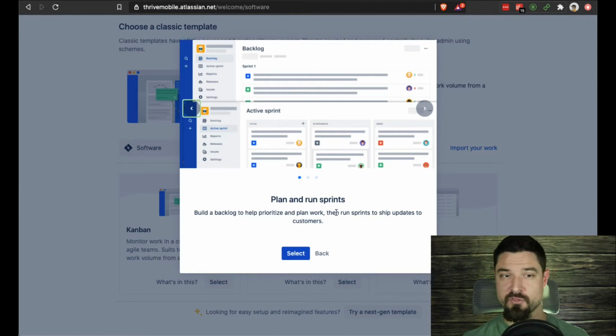As you can see, you plan to run sprints, and within that sprint you say, all right, this is the work that we are going to accomplish, and you walk through and work on that work. Then at the end of that 2-week sprint you're supposed to have a product that is fully available, shippable, and ready to go out to your customers, because theoretically you develop the feature and then it's gone through the QA process and the product review process, and that's basically where you're going to end up.